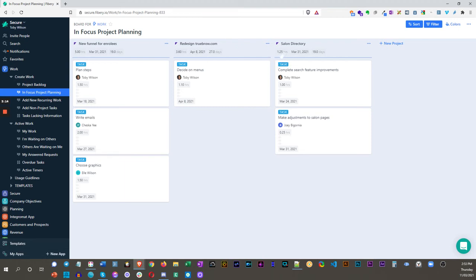So once that's there, we create a new task when we initiate a project, and we put the start date. If we're starting the project today, we can put today's date, and then we assign that task to the project owner, and we set the status to done. All that does is allow these calculations to occur. It's not something that's meaningful to our work going on, we just create the task, do that, and then it's gone and out of our way. That's the way that we start a project.